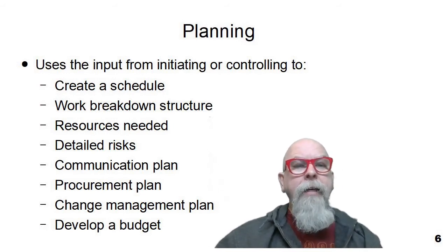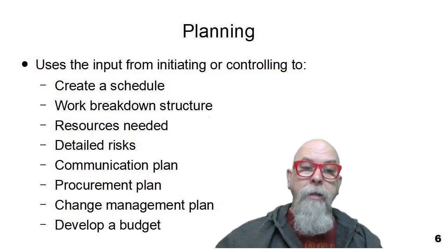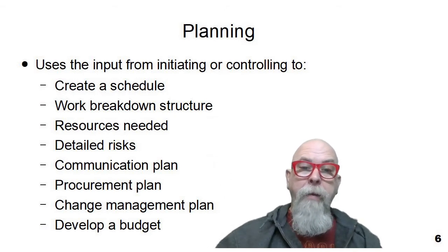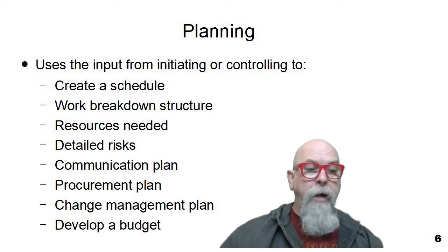And lastly, during the planning phase, we need to identify a more formal and more complete budget by using our subject matter experts and several budgeting techniques: use the work breakdown structure, use the contracts we're going to create, the procurement plan, and all of the other plans, and create a good detailed budget for us to move forward with on our project.